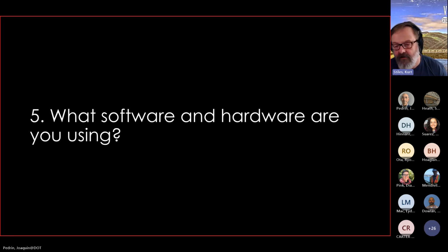So the first thing you've got to do then is to ingest that formal design surface and then fix it and repair it, or you throw it back to them and say, this is terrible, you need to redo this, because you're asking me to make judgments that are getting into design. I have an engineering background, so I can say something about a roundabout design or a bridge design or whatever, but that's not my job. So a lot of times we'll toss stuff back to the project office, which is kind of difficult for them to hear.